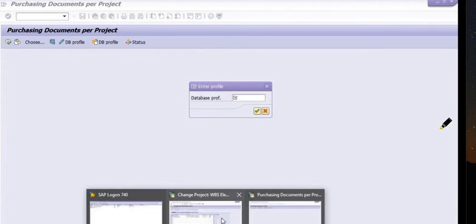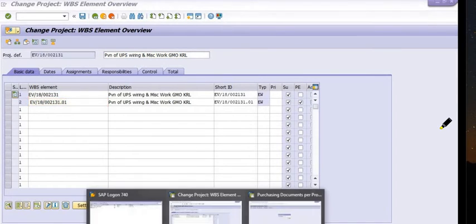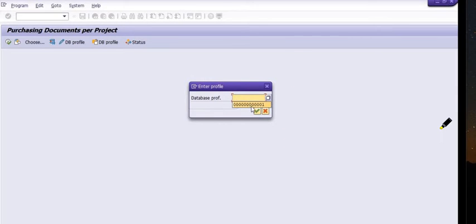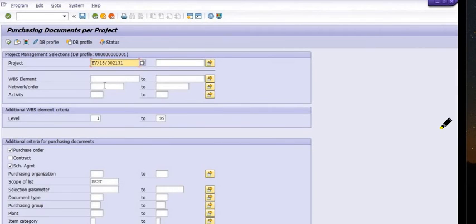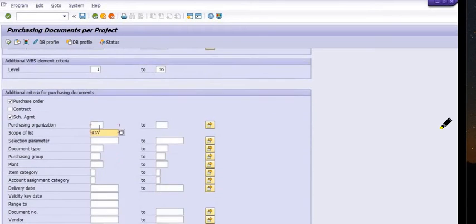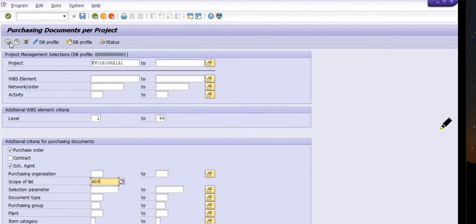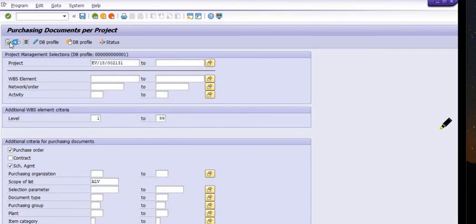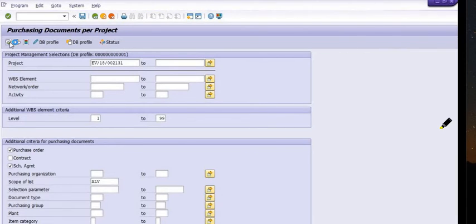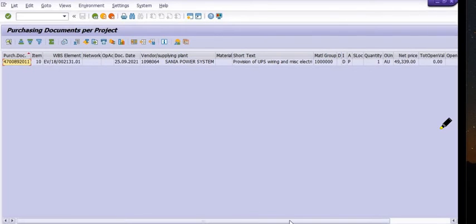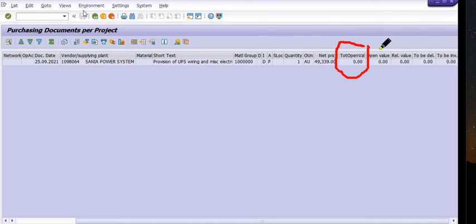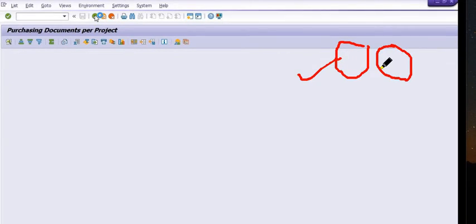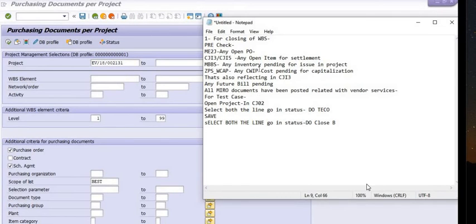We are going to execute transaction code ME2J to check if any purchase order is pending or open. Fill in the project definition, set scope of list to ALV, and execute. If any open line item or open purchase order exists, the system will reflect this. In our case, no open value is shown — all values have been successfully processed and payment to vendor is done.